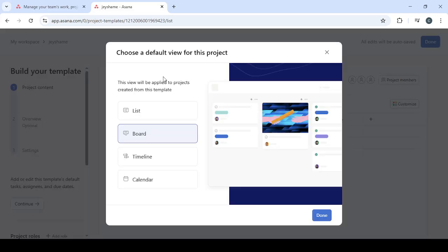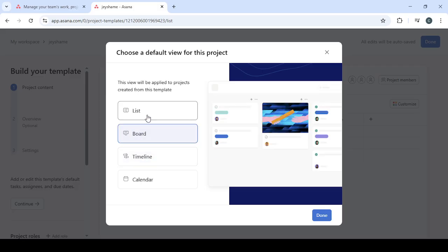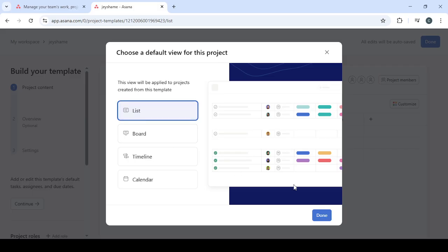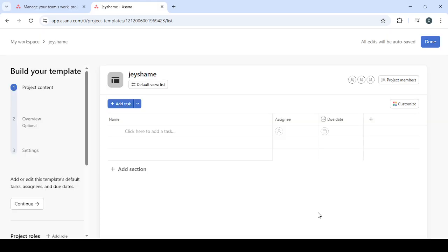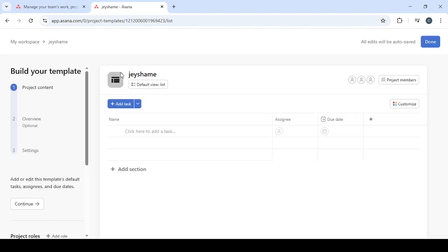From now on, whenever you need a similar task, use the template by duplicating it. Create a copy, then immediately customize the essentials. Update the title to match the specific request, adjust dates and assignees, and tweak any fields or subtasks that vary this time. Confirm attachments are still relevant and remove anything not needed for the new instance.